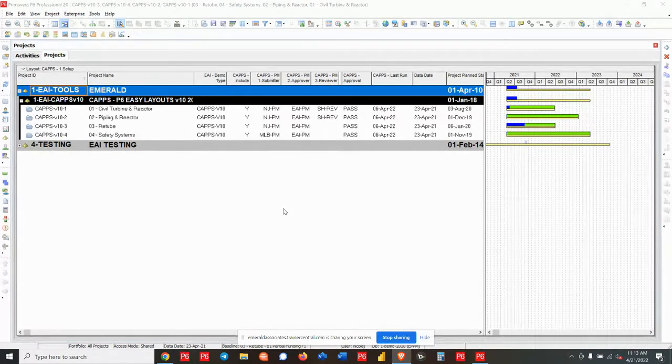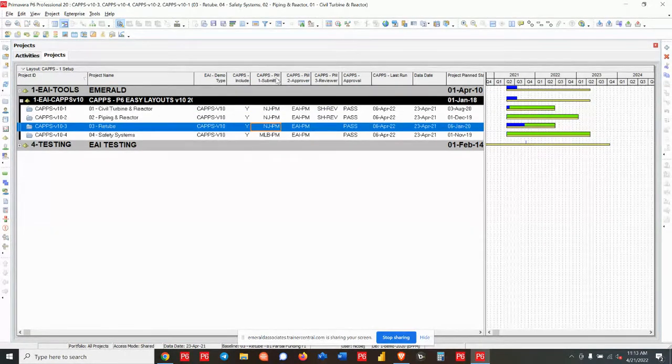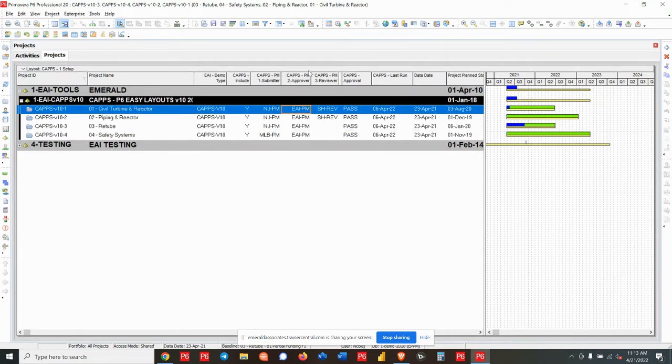Depending on how you want the updating to go, some of our clients have a project manager who is going to be the submitter. And that submitter may or may not have an approver. And we also have the ability for someone to review. So they're not approving, but they're reviewing, giving feedback. Okay, so you can do it a variety of different ways.